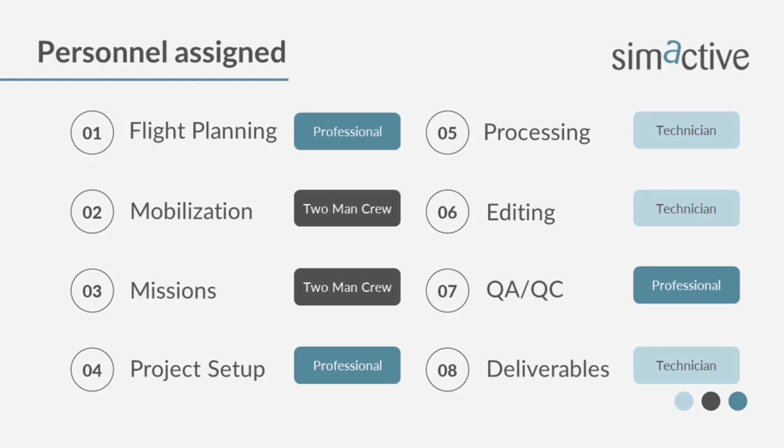And the reason I bring these up is there are 3 different rates of pay for these types of people. If, for example, you're a professional, a licensed surveyor, it could be anywhere between $175 and $250 an hour. Your 2-man crews, probably $225 an hour, something like that. And your technician, somebody earlier on in their career, is probably billing out at maybe $80 an hour or something like that. But some of that, obviously, we don't control.